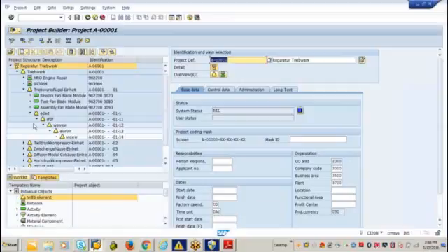Raja, I have a question. We can create only 7 WBS elements under one project, right? No, there is no limit. That's what I said. Suppose the customer requires some 15 levels of WBS, but in real time it won't go beyond 3 or 4 levels of WBS, because it's very complex. You need to break down the entire work into your structure. So it won't go more than 3 or 4 levels. That's the max I have seen in my 8 or 9 projects of experience. Okay.